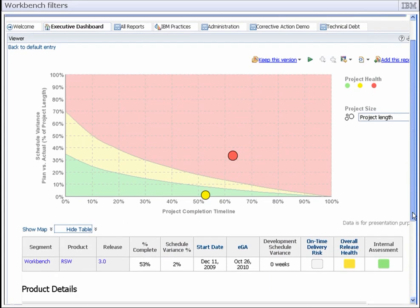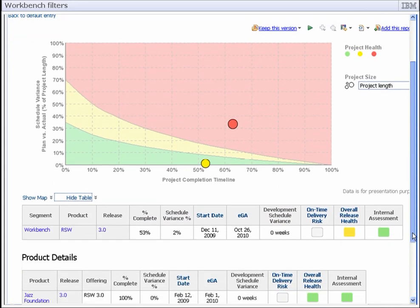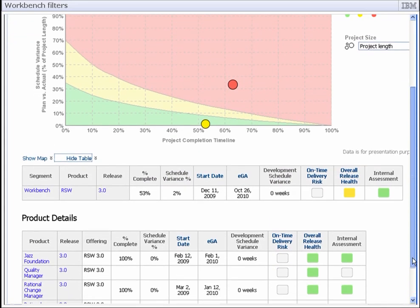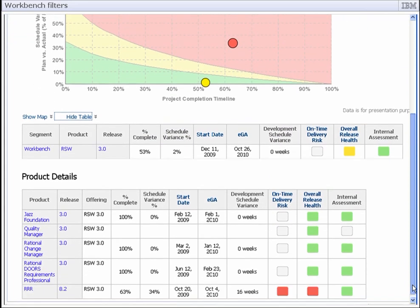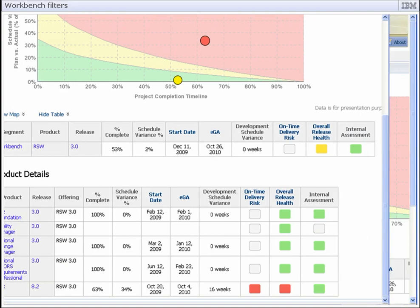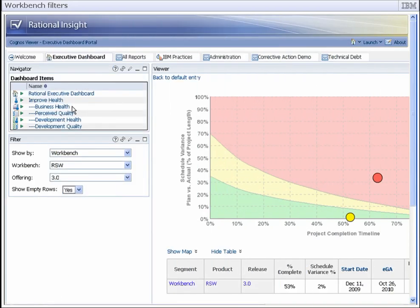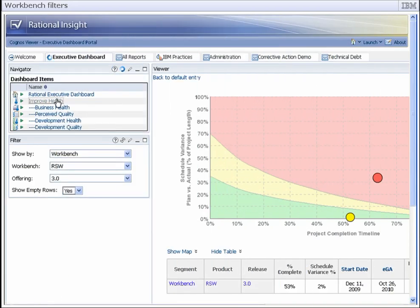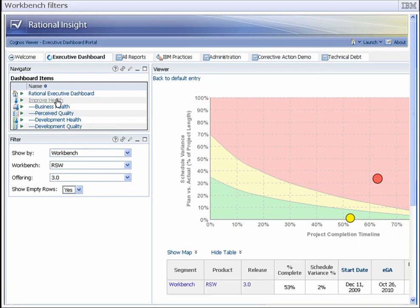The status of the workbench is yellow, and one of its products' status is red. The on-time delivery risk for RRR 8.2 is red, and its development schedule variance is 16 weeks. Since the workbench ships three weeks after RRR 8.2's scheduled EGA date, this variance could delay the shipment of the workbench.